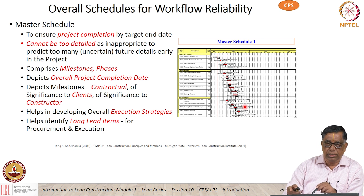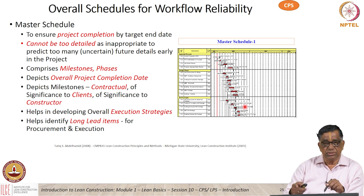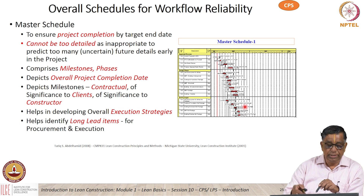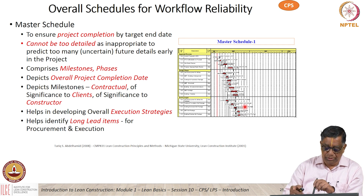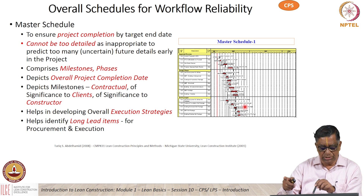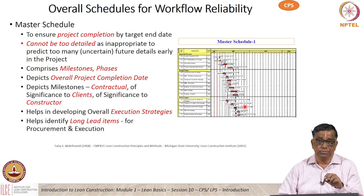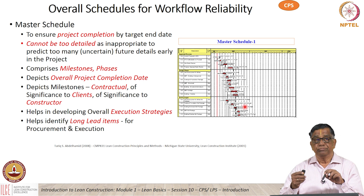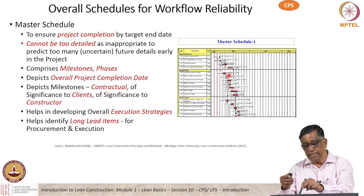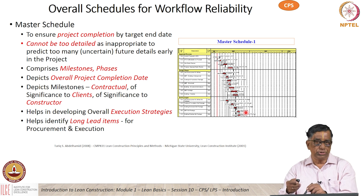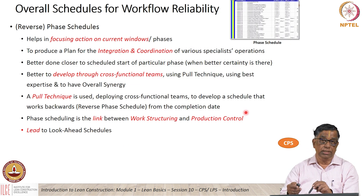From the master schedule we carve out the various phases — phase 1, phase 2, phase 3 and so on. The master schedule contains all the contractual commitments in terms of completion date, milestones and so on — it is actually a sacrosanct document that says what we should do. From this we derive the broad execution strategies and the various phases. It also helps us identify long lead items — items that take three, four, or six months for production — which get identified during master scheduling, and whose orders need to be placed well in advance.